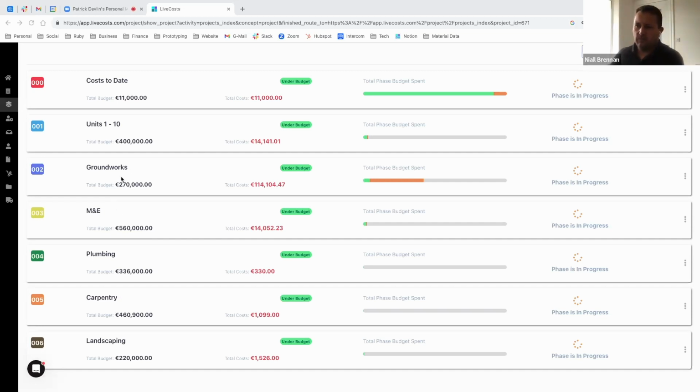So what we would recommend is that we would try to break that down into the individual element, being the plastering element of that. So that, if we are going to issue a purchase order out into the world, we're issuing it clearly into one individual element, and then we track against that individual element. So I would say 90% of the bill of quantities will be in that structure that you need, but there are just those elements that you may need to take out. As I say, plastering and painting are a good example of that.